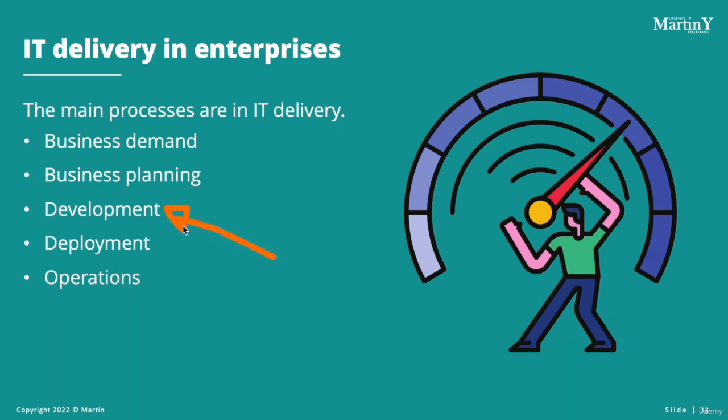In DevOps, the product team will work with user stories. A team must break down the product into components that can be defined as deliverables. To do this, we should have a clear definition of the user story, and the user story always has the same format. Any user story needs to have an acceptance criteria, or the definition of done, or DOD.